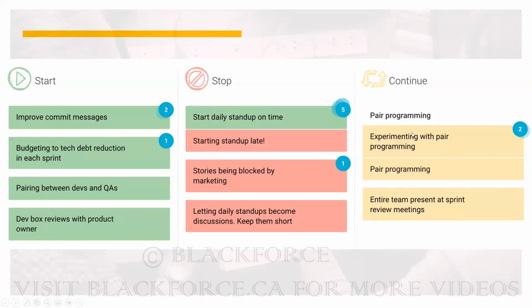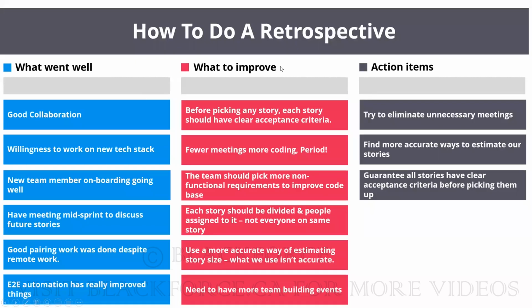When you gather the data, you now discuss this to generate insight, look at action items, then you close your retro. This is another type of retro. What went well? You discuss the thing that went well during that sprint, that 2-week sprint. What are the things you want to improve on? And what are the action items that you gather from that retro?